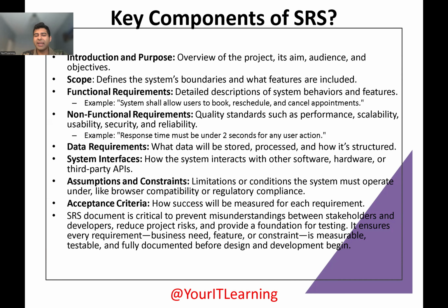Think about it: if we don't have clear directions, and we create something wrong, then we have to recreate it. A lot of infrastructure is needed, a lot of resources are needed. Every agile team has at least 5 to 7 people, like the scrum master, 3 or 4 developers, BA, and product owner. All of them have to sit down again and redefine the requirements.